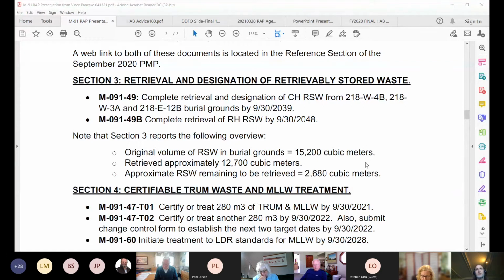Knowing that the milestone is going to slip or there are external forces acting, you have to pencil in a due date. And then you have a reason to say, okay, well, we didn't make the due date and here's why, and do a self-assessment. But I disagree with Steve that milestones aren't important. Maybe I was taking it out of context, but just wanted to jump in there.